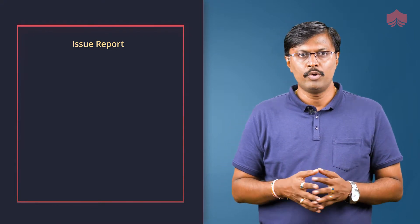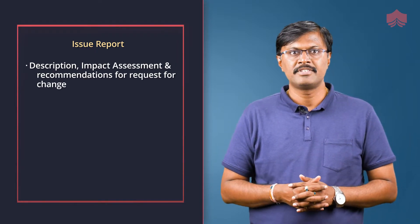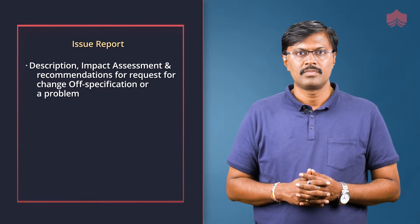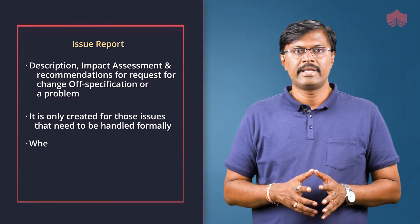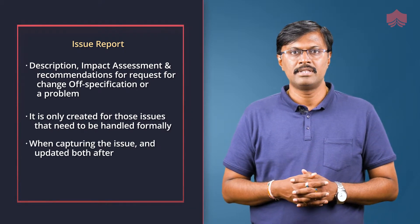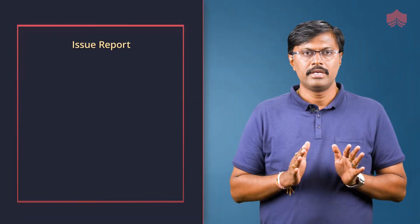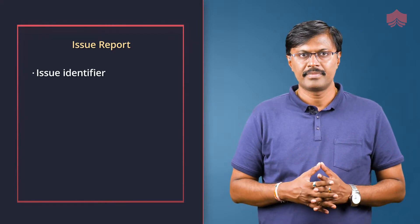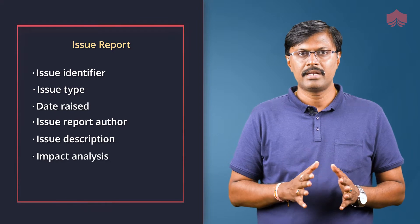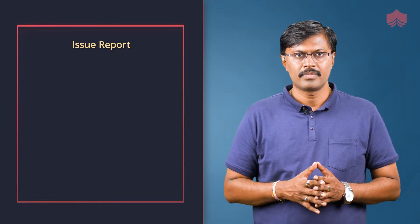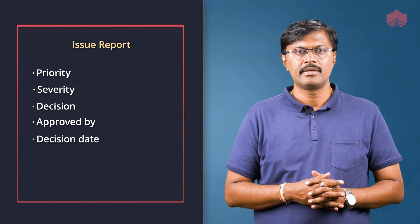An issue report is a report containing the description, impact assessment and recommendations for a request for change, off specification or a problem or concern. It is only created for those issues that need to be handled formally. The report is initially created when capturing the issue and updated after the issue has been examined and when proposals are identified for issue resolution. Issue report is composed of: issue identifier, issue type, date raised, issue report author, issue description, impact analysis, recommendation, priority, severity, decision, approved by, decision date and closure date.